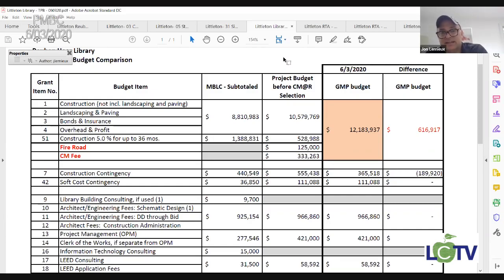Obviously, I think that... Brian, when did we get the bids, on what date? Like March 8th? So Brian P., our filed sub bids were opened on May 12th. We've actually reached out to some of the other disciplines where we really need them to hold their number, and they're able to hold their number. I think we said, John, it was the 25th of June is the date the filed sub bidders hold their number till.